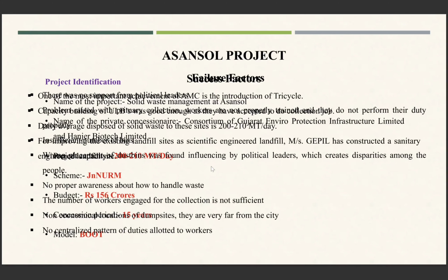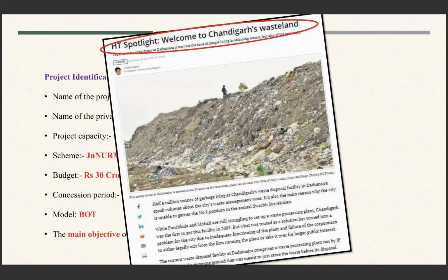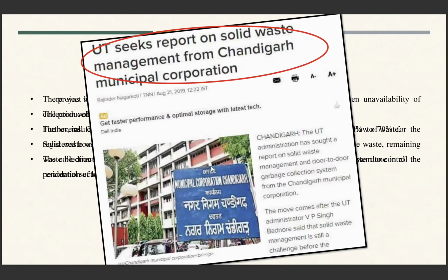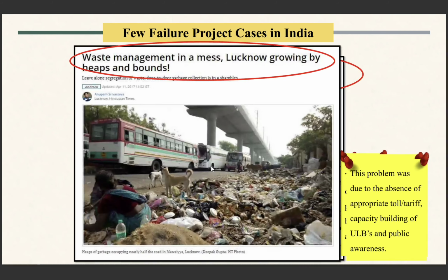Next one is about the Asansol project, which is in West Bengal. This involved private partnership through the BOOT model, and the failure was due to biased placing of the bins, influenced by the local political leaders, and it led to the failure.